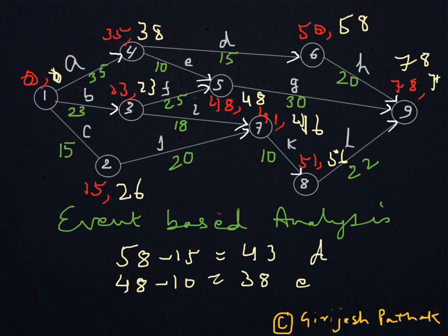So here from start, say from 1, this is the line, that is 1 to 3. Here you are finding that earliest time and latest time are same. Similarly, next is this node 5 where earliest time and latest time are same, so we connect like this, and then obviously on node 9.